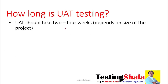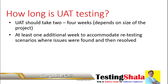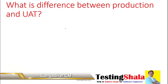How long does UAT testing take? Two to four weeks of overall UAT testing is generally sufficient. Sometimes it may be two weeks, sometimes maximum four weeks, based on the complexity involved in the application. Additionally, one week of contingency should be kept in order to retest or resolve any issues found before deploying to the production environment.